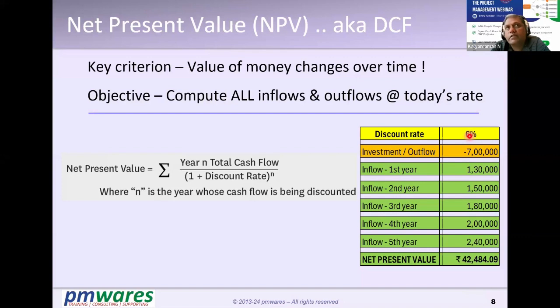If that fluctuates, you can hedge in your contract. That's called a risk mitigation model, also called the economic value adjustment. That is a contractual term when you enter into contracts for the long term. You can factor that in. If the rates differ, exceed or decrease, the other party is suitably compensated. So those are all principles where you build this scenario.